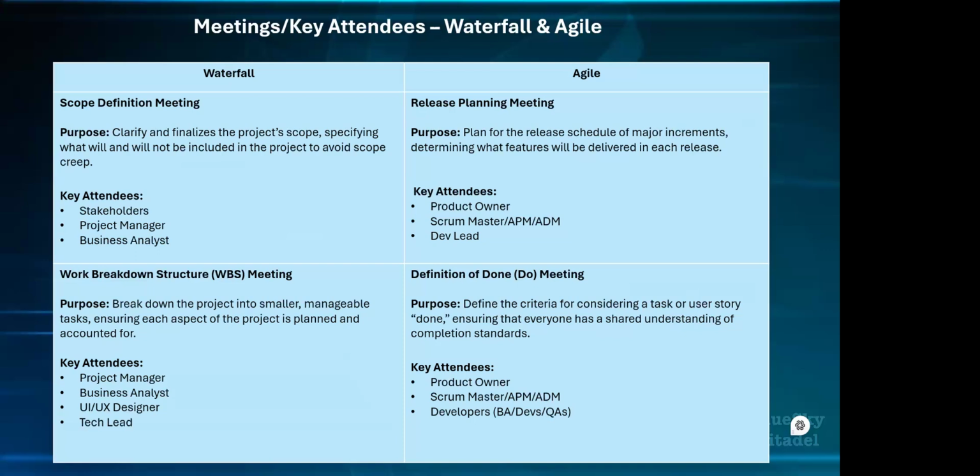At that meeting, we identify the essential criteria for task completion. You list quality standards, documentation, testing requirements and all that. At the end, what you're looking to get is a definition of done document to be used, validated and agreed by every member. Every member has a shared understanding and they all agree that, yes, this is a checklist that we want to work by as a team.